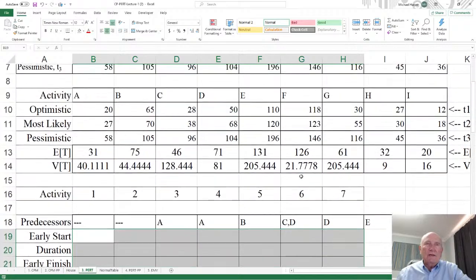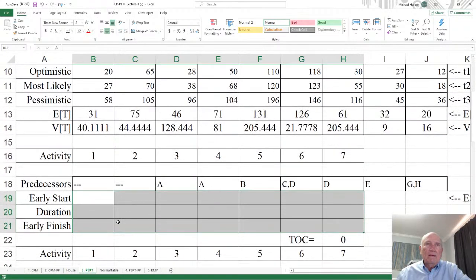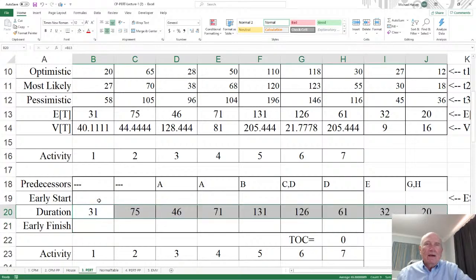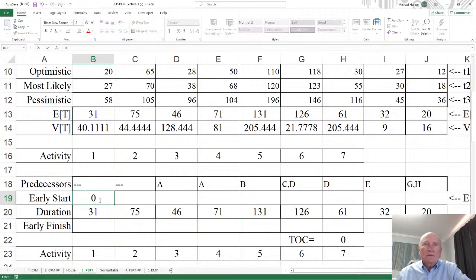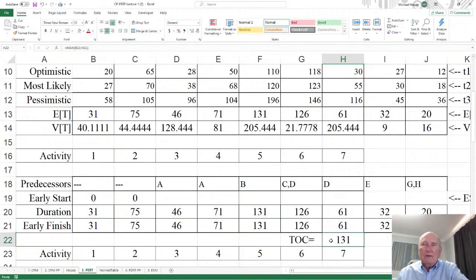Okay, now what I want here is the durations. This right here is going to equal ET. And then copy this over. There you go. And then early start here, this is 0. This is 0. Now remember, these are just going to be the early start plus the durations, and copy that over. You can do that on all of them. And by the way, let's delete this for now. This is 0, 0. This is going to be A.